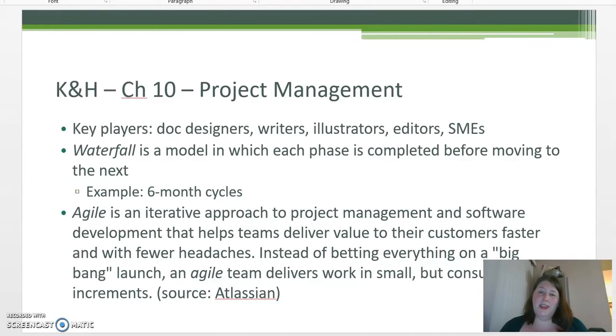Now, I'm going to expand a little bit on that so you can understand what the process is like. So, with my company, we work in 2-week sprints. So, software teams are meeting and planning what they're going to do and accomplish in those 2 weeks. So, they'll have tasks set out and broken down, and tasks are assigned different weight levels, how long they will take to complete.